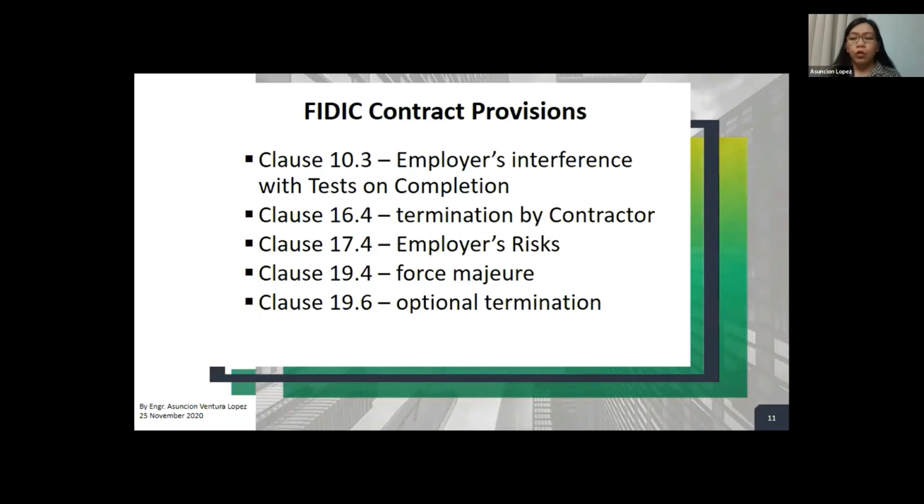So in all these cases, the contractor must show that the delays that happened have affected the schedule of the works, and that they affected the completion date of the project. So you have to prove that. Now, the contractor must highlight the delay or the impact on the critical path of the project. I'm sure you are very well versed with that, being planning engineers.